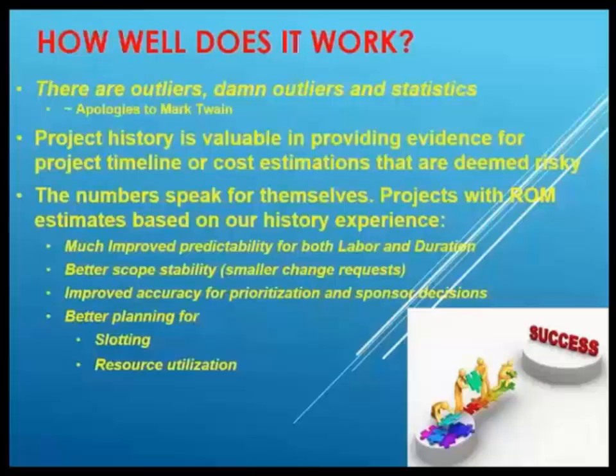In our organization, we've seen much improved predictability in both labor and duration, better scope stability. So we haven't seen fewer change requests, but the change requests are smaller in projects we've estimated. So I think the term scope stability is probably a good accurate one.